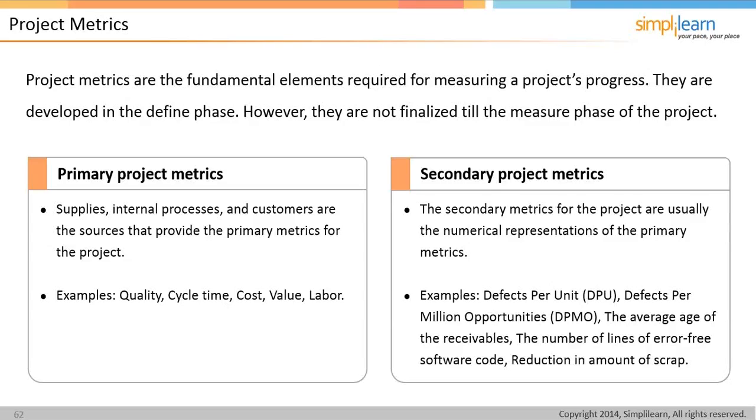So rather than saying I want to reduce my freight costs from $1 million to $500,000, I might say, you know what, I want to reduce my freight costs as a percentage of sales from X2 to X1, because that metric might be that your freight expenses go up, or they might come down, independent of how well the process is performing, based on sales volume.